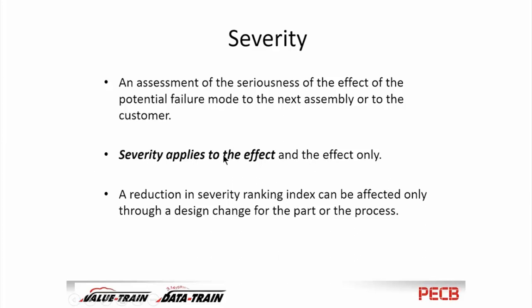And the only way we can change this is, once the system is designed, if that failure happens and this effect is a result of it, the only way to change that is to change the design of the system in the first place. Either so that the effect is mitigated when the failure occurs, or that the failure is less likely to occur.